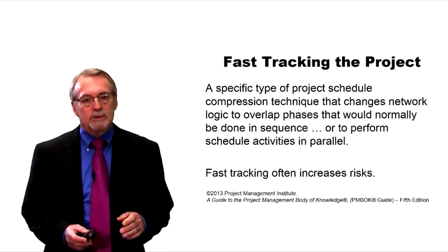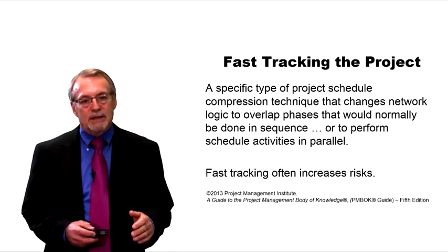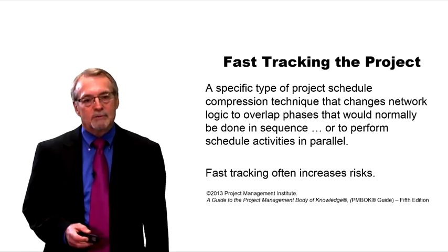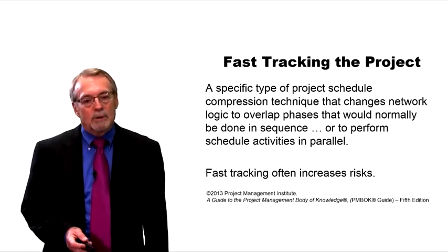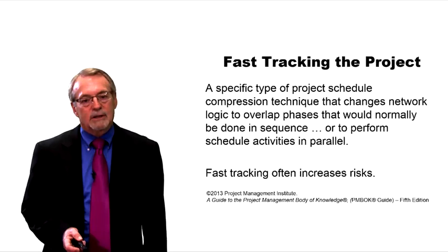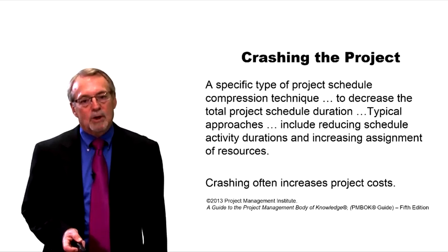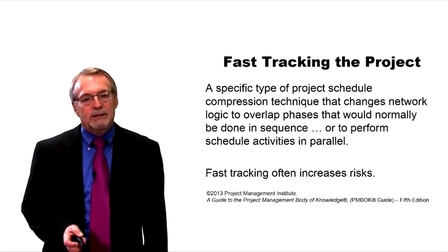Fast-tracking the project means we're going to do things simultaneously, concurrently, in parallel, that we thought we had to do in sequence before. The problem with crashing the project, it can increase the costs on the project. A problem with fast-tracking the project, it can increase the risks on the project.